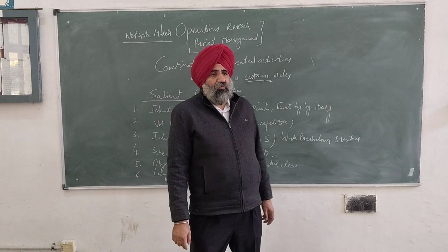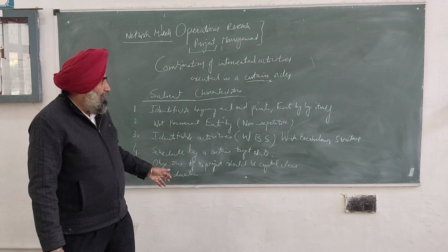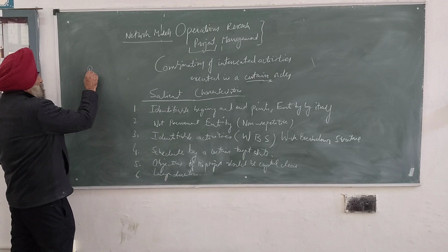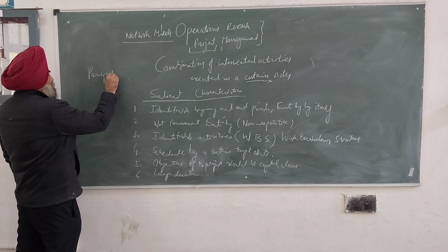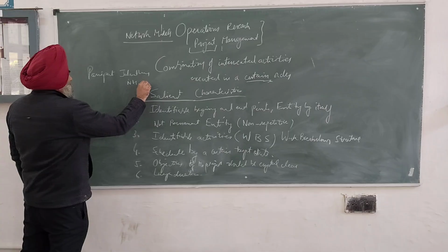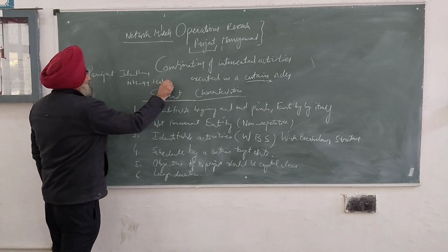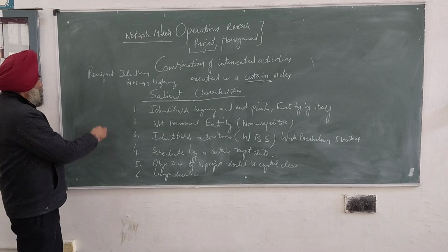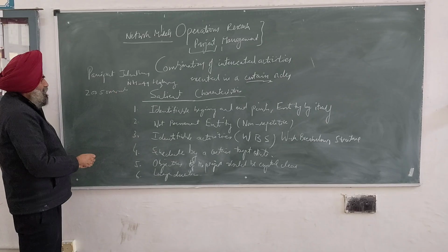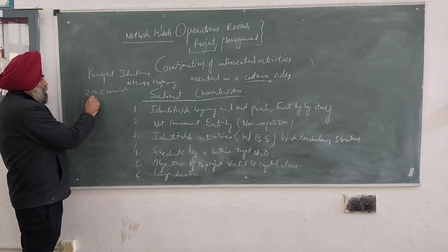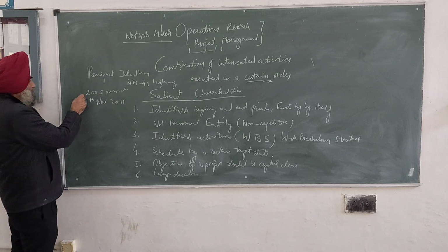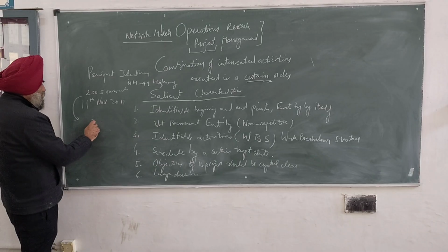Starting with one year, some may last up to ten years. If I talk about one project, I may take one example. There is a project, Panipat to Jalandhar, NH44, now a highway. The project was started way back in 2005 onwards, and it was supposed to be completed by 11th of November 2011. But the project could not get completed till 2020.